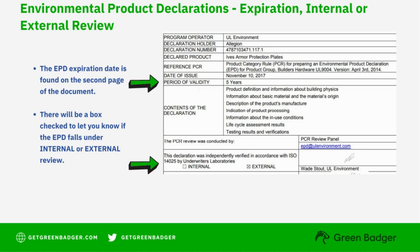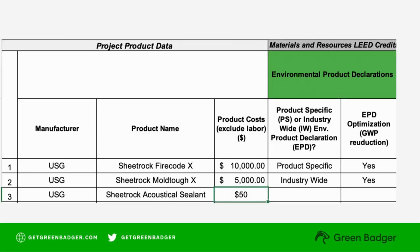The next step is just making sure the EPD is valid, and this information is usually on the first and second pages. Ensure that the certification date is within the time of construction. In this example, the EPD was issued in November 2017 and is valid for five years up to November 2022. There's also a section on the LEED cover sheet for you to note if the EPD has internal or external verification, and you can note if the product had an industry-wide or product-specific EPD.